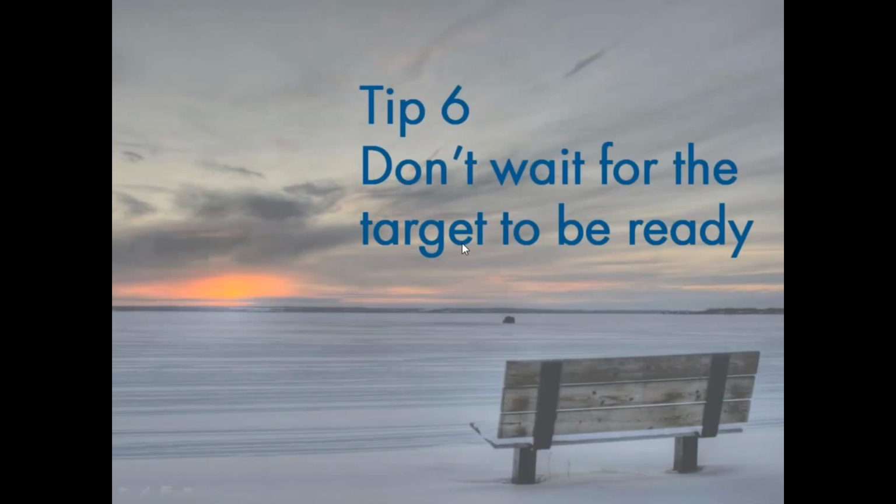Tip number 6. Get started early, basically. There's so much work to do on the data quality and the business rules, so there's no reason to wait for the target to be ready, or even chosen. We often see that projects get delayed because the team only starts the work once the management has decided which system is the final target. However, you only need to know that a migration project will come, and so you can start the preparations right up front. Regardless of the system you're migrating to or from, you need to have a thorough understanding of your current situation so you can be one step ahead once that particular project gets the green light.